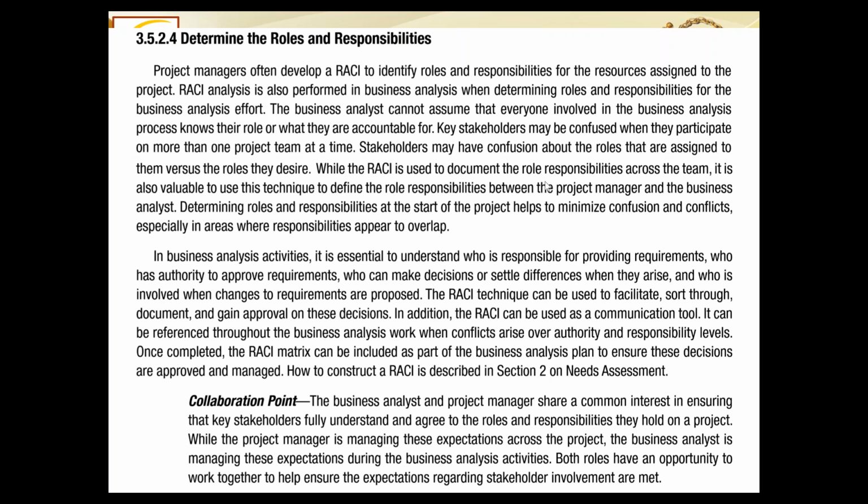While the RASI is used to document the role responsibilities across the team, it is also valuable to use this technique to define the role responsibilities between the project manager and the business analyst. As we have seen during our discussion earlier, there are so many collaboration points where the business analyst and project manager share certain responsibilities. So they coordinate and communicate with each other. How much of that responsibility is to be taken over by the project manager and how much is to be handled by the business analyst, that will also be clarified through the RASI chart.